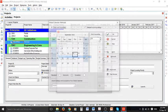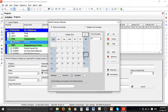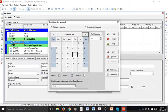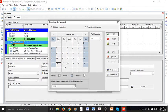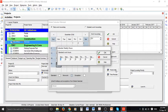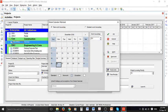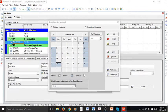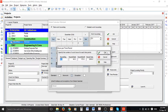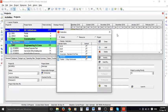I can modify and different months of the year are illustrated in here. I can add, for example, Christmas holidays and the break at the end of December to this calendar. I can select 26 of December which is the boxing day and make it a non-work day. Then I can visit workweek and these are the hours we have in each day. It gives you option to change from 8 hours per day and select other available options. If you press OK the settings are changed.